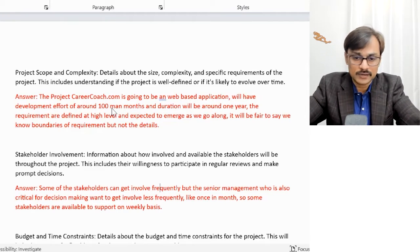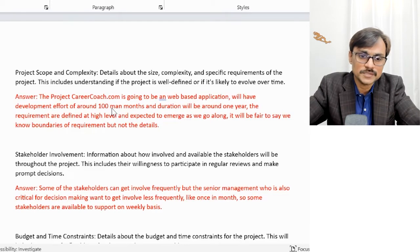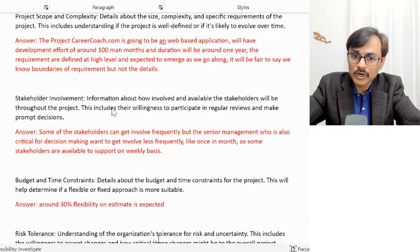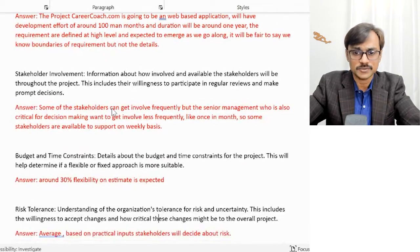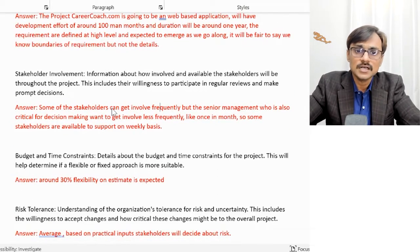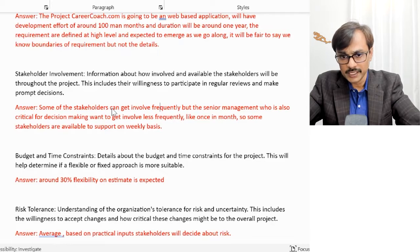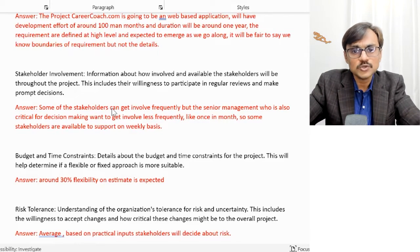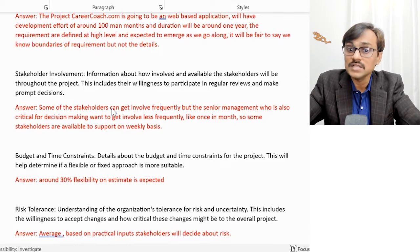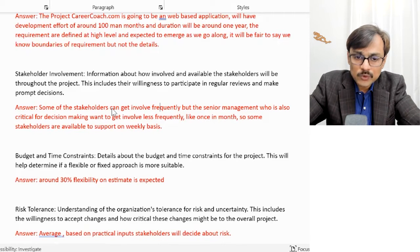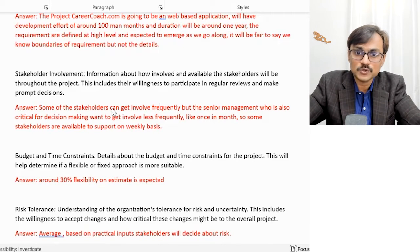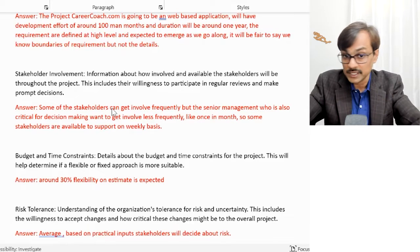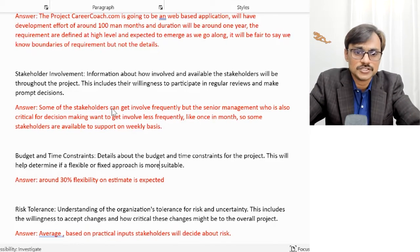The second question was about stakeholder involvement — how stakeholder engagement will work. My answer: some stakeholders can get involved frequently, but senior management who are critical for decision making want to be involved less frequently, like once a month. So some stakeholders are available on a weekly basis, but others are available only on a monthly basis.